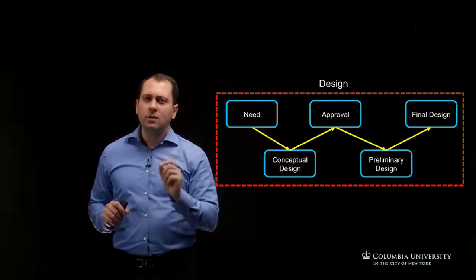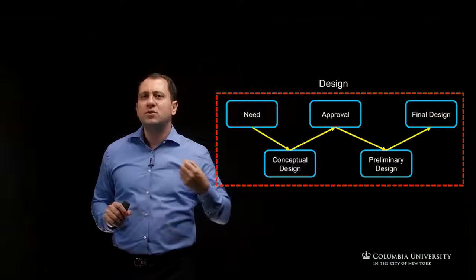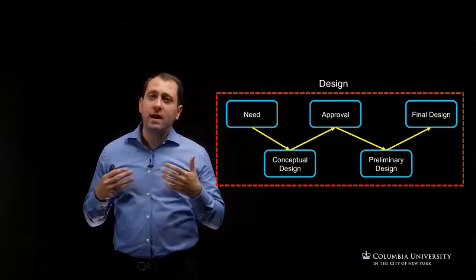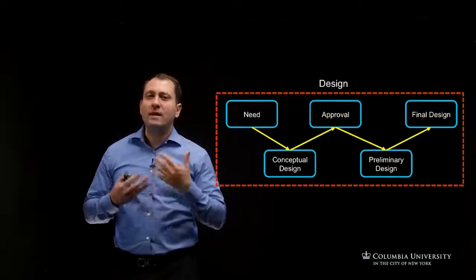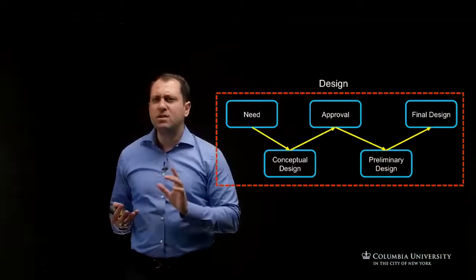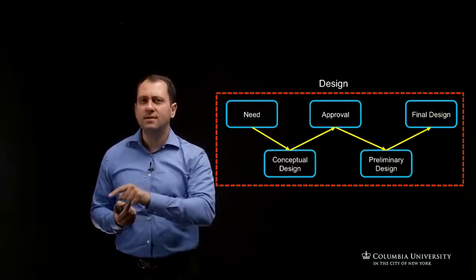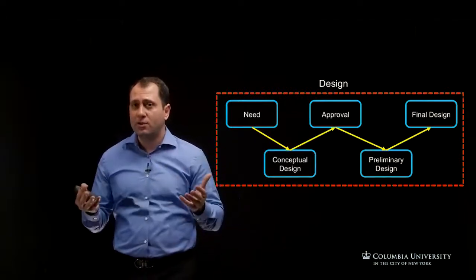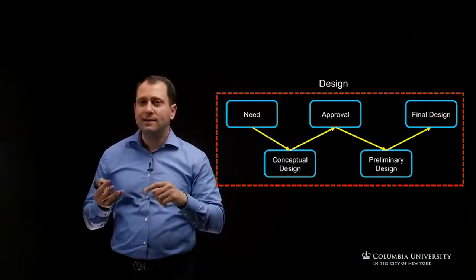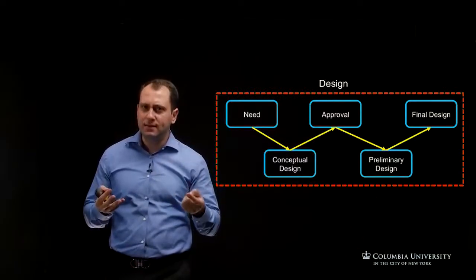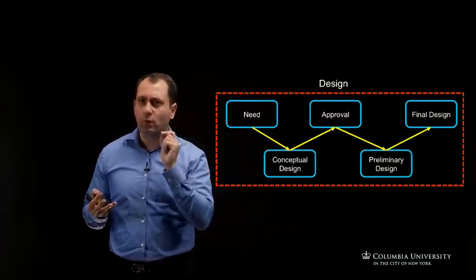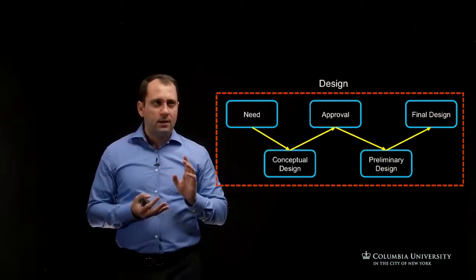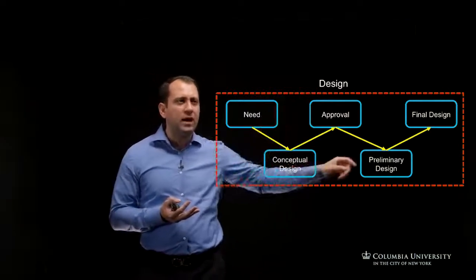Third, a cost estimate based on the conceptual information available. Of course, the amount of conceptual design documentation available varies based on the complexity and the size of the project itself, which makes sense. The bigger the project, the more expanded documentation is needed to define the scope of work in that phase. So once it's approved, it will go to the last two.